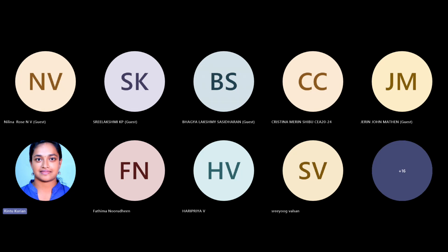As you all know, when you purchase a steel bar, it is 12 meters long, and you have to cut it according to your length requirement, which is specified by the BBS data. If you are not cutting it right, at the end of the day your wastage will be more than the actual requirement. So that is the main problem.